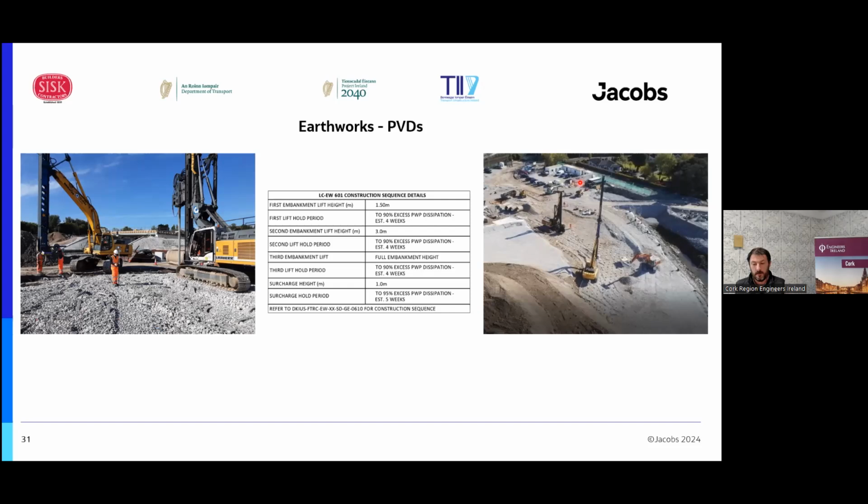So basically, the stitcher, which you see the excavator on the left hand side, we used a 20 meter stitcher on a 50 ton excavator, and it wasn't able to penetrate the ground to get the drains in. We had a layer of made ground over the alluvium, which we couldn't get through, and that layer varied in depth anywhere between 5 to 8 meters. The way we overcame that was we modified a sheet piling leader rig, on the right hand side of the left hand picture. A 6 meter spike was put on that, and the weight of the excavator, about 50 ton, and the vibration effect used to install sheet piles actually managed to displace the boulders and obstructions in the ground to make a path through.